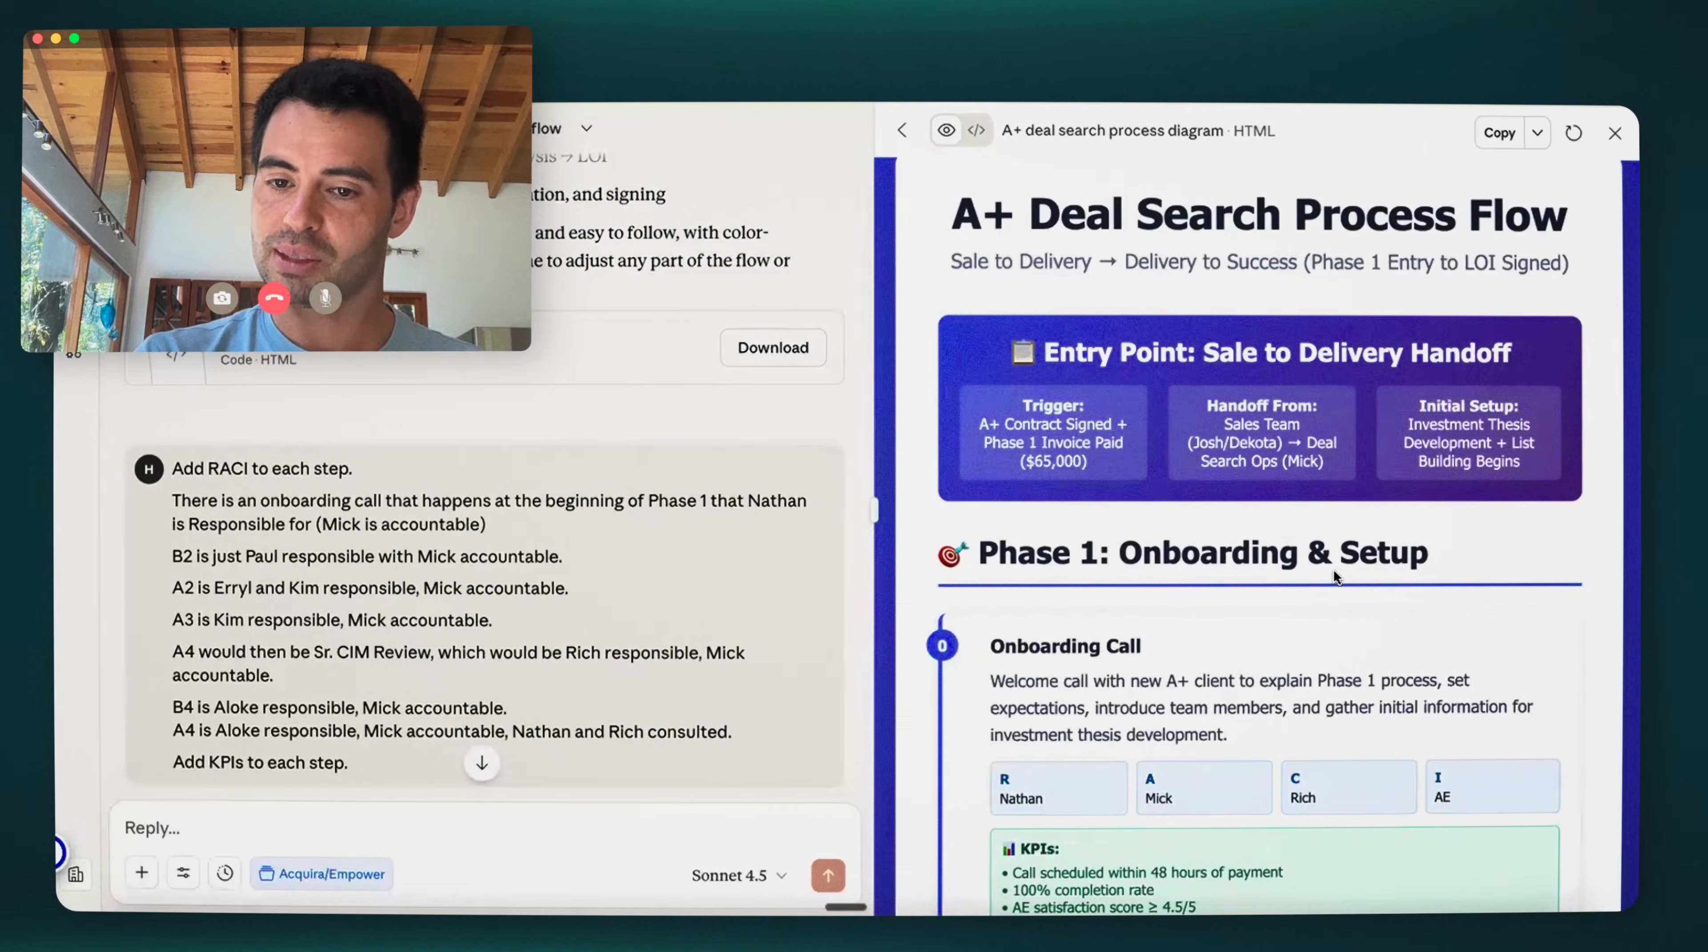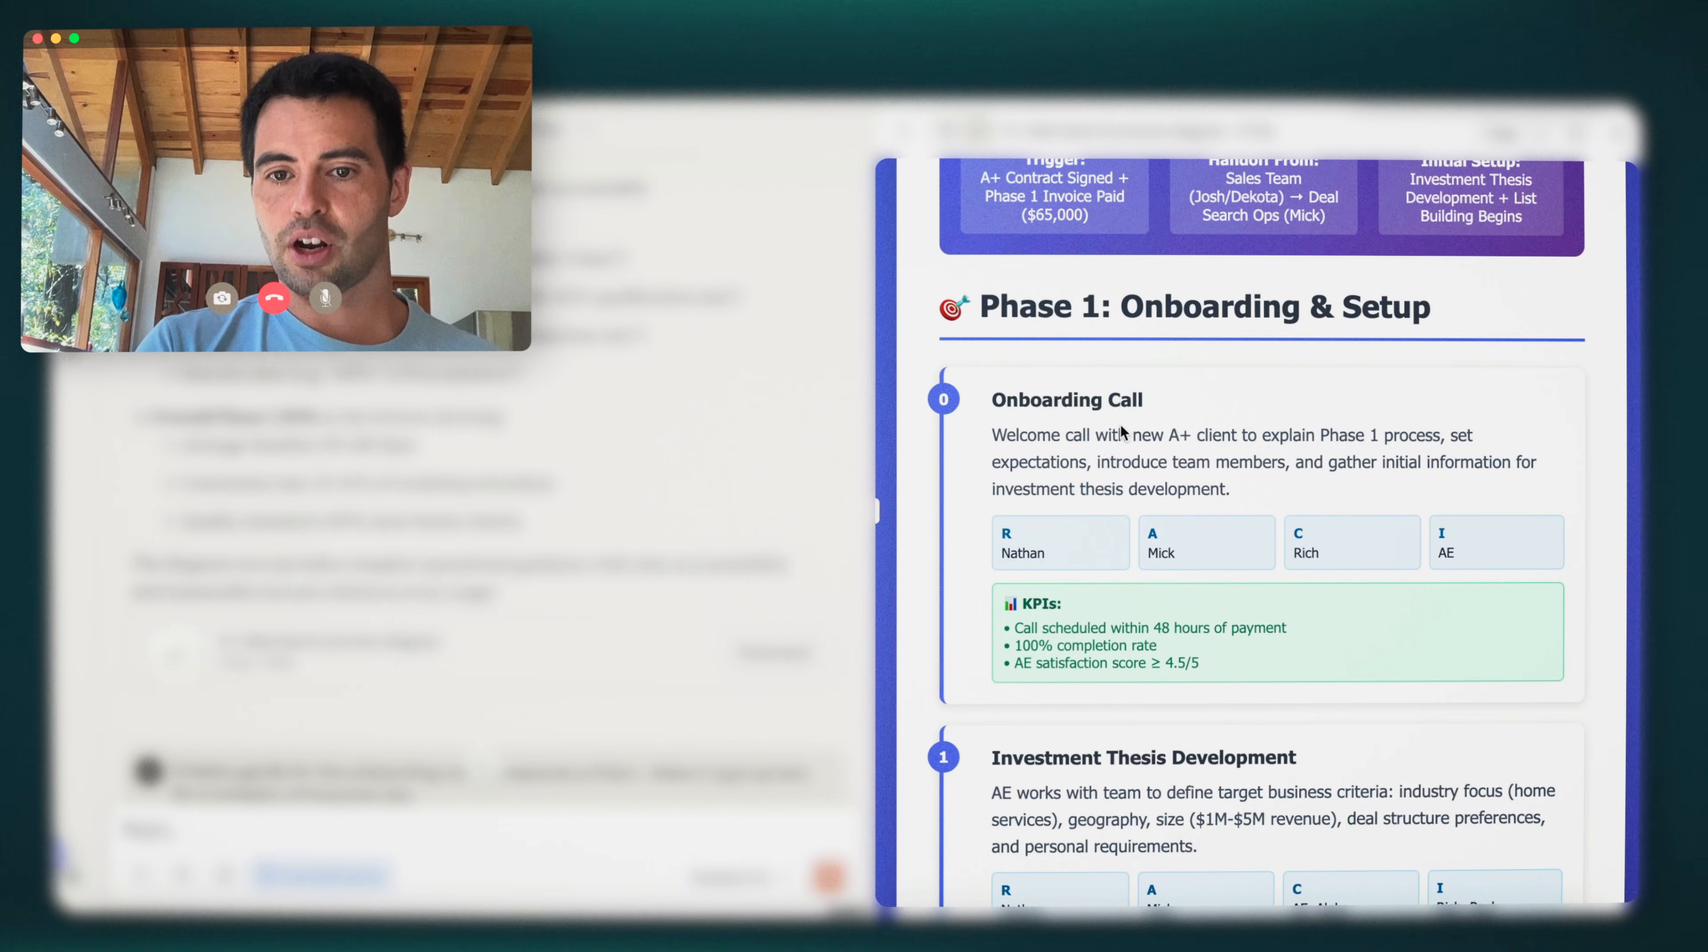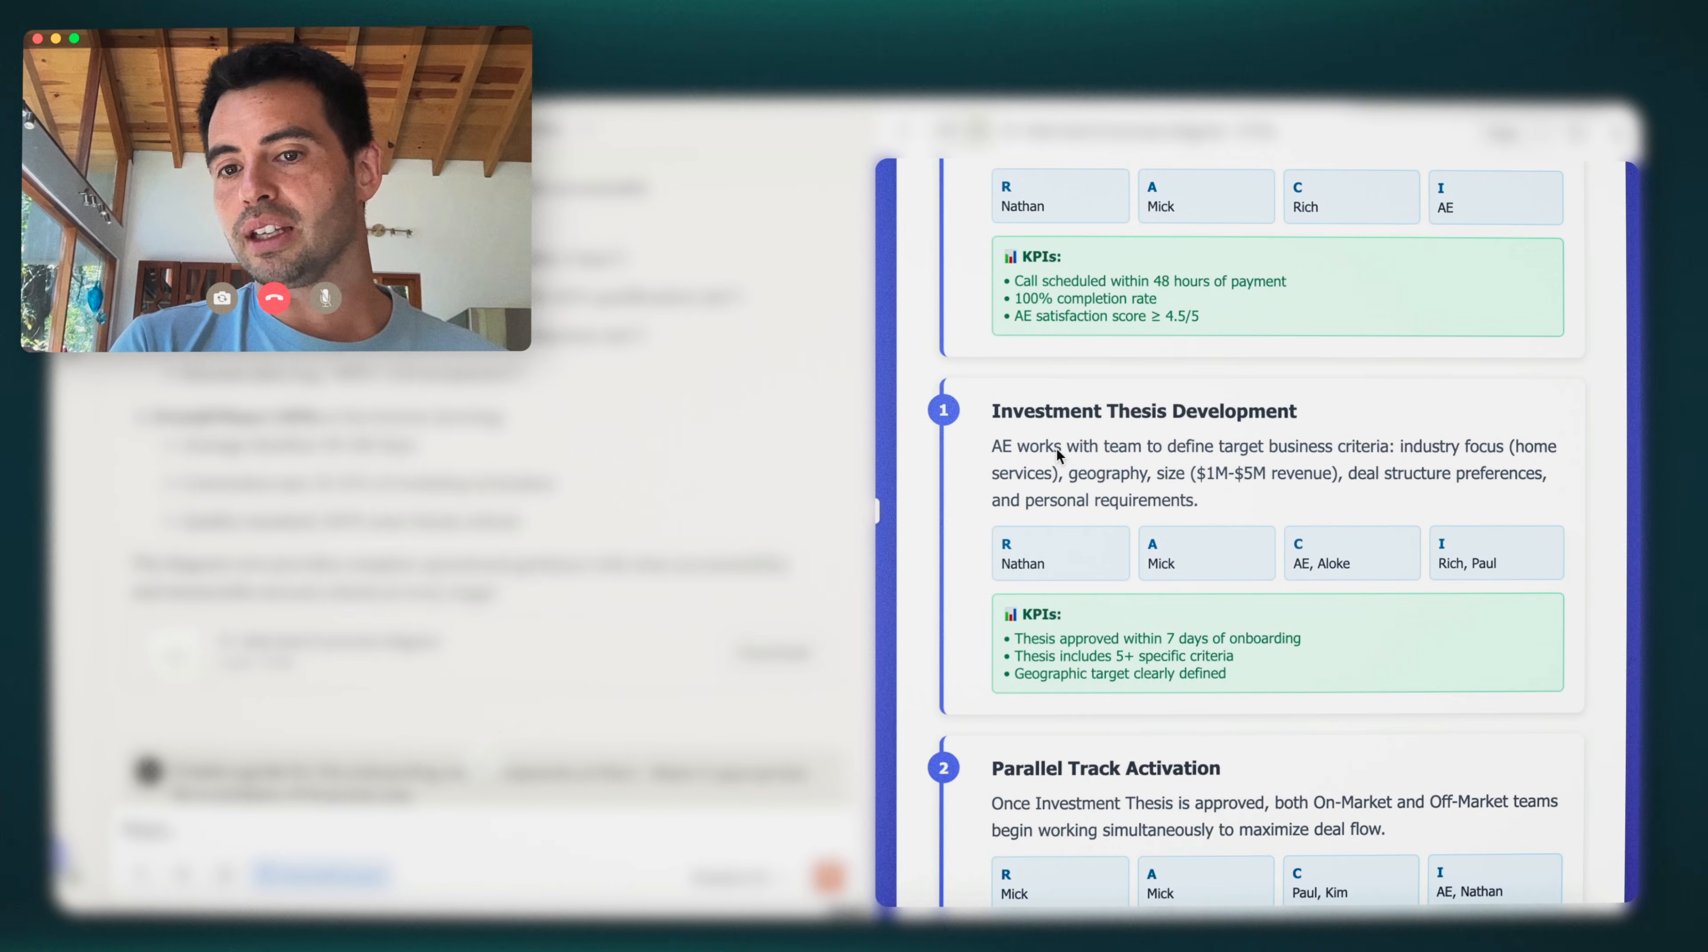Consulted is who does the responsible party typically need to have a conversation with to get this done. And so that means it's a two-way street. I'm going to talk to them and I need their input as well. And informed is who just needs to be informed one-way conversation. Who needs to be informed that this happened? That's it. So for each task, we have a responsible and accountable, consulted, and informed.